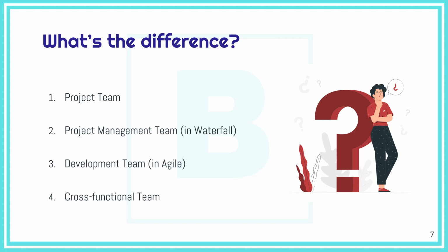Then we started section 3.1 about creating the teamwork environment. The project manager needs to make sure that they create the teamwork environment, provide the team with what they need, and accommodate people who are located on site and people who are working remotely. And we said that in agile it started with having people on site, in order to remove any waste, like operating in the war room, and that the project manager needs to make sure that they also provide some private space to the team members, like in the form of caves, along with the common office design.